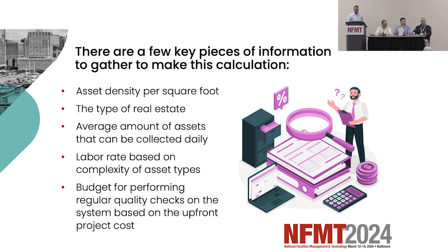Labor rates are associated based on complexity, like I mentioned earlier too. If we're sending an architect or an engineer to that location, obviously this person has a higher labor rate than a non-technical person that might be collecting information off of a fryer or a coffee grinder, for example. So, that times the number of hours, times the number of assets per day or per hour that our team can collect, and the efficiencies we can gain. If we don't have to schedule site visits and we can just show up unannounced, and there are no security restrictions, we can crush these events. We can come in way under cost, and we do.